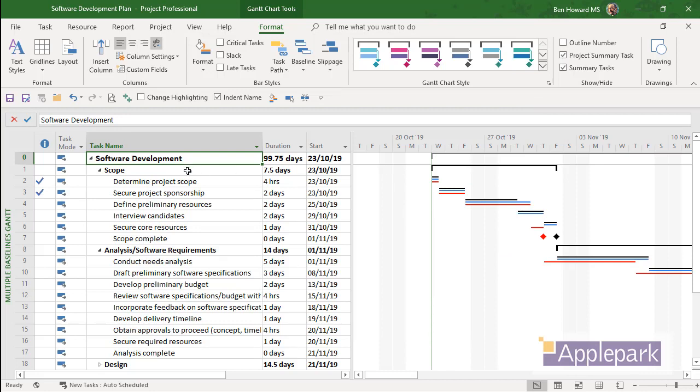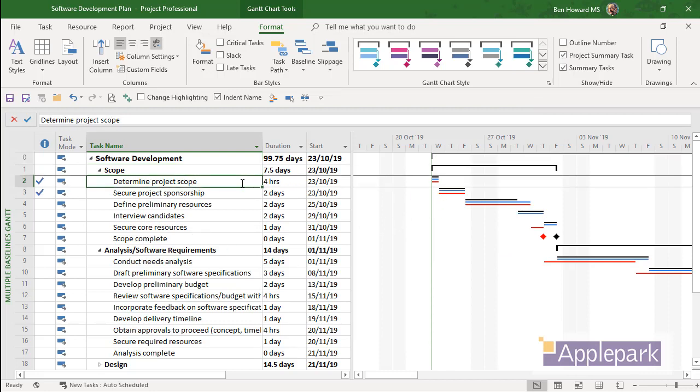So now our Project Summary is drawn as a grey bar. Our normal summary tasks are just normal black. And then our detailed tasks have those three different bars on them, representing the current schedule, baseline 0 and baseline 1. Enjoy the blog post. Enjoy this video.